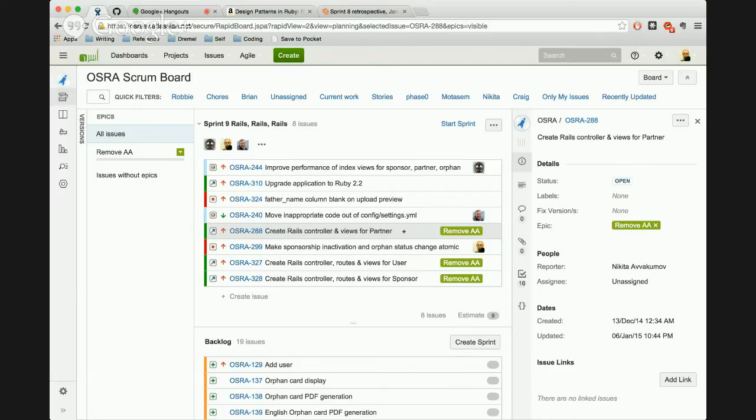Well, it'll be up to Christian or whoever actually starts working on this, but I don't think that we necessarily need to refactor the entire controller in one go for using facades. I think we can do it in a couple of actions, or maybe just a single action. Let the team have a look at it, have a discussion about whether it helps or hurts before proceeding with the rest.